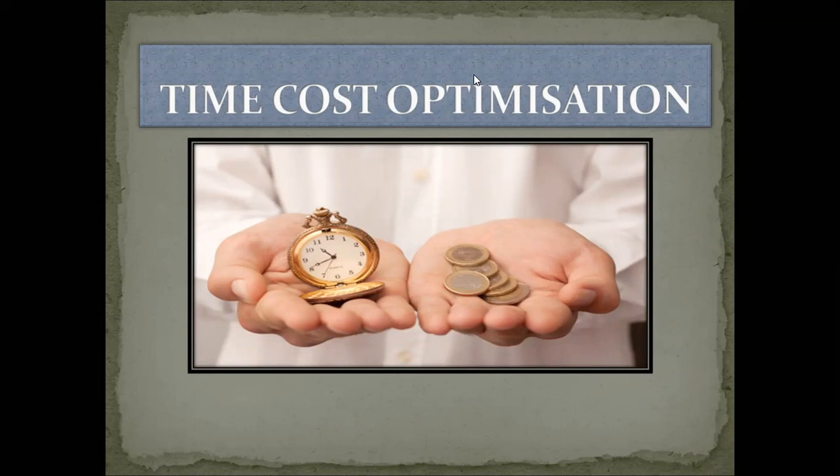Suppose for 10 laborers it is 3000, for 15 laborers it becomes 4500 per day. Then if those laborers work with you for 1 month, 1500 into 30, so nearly 45,000 rupees will be increased.